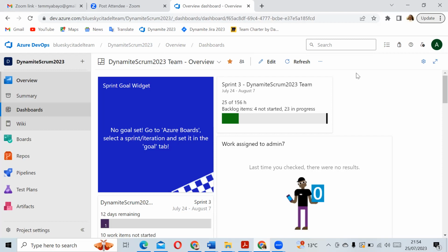So Scrum Masters, that's another coaching you need to give your QAs. When they create a bug and they want the developer to work on it during the sprint, they need to put the severity there. And once they save it, they shouldn't save and close. There's a drop down beside that. If they click on that drop down, they can save, then go back to the state and click in-dev. So that takes it back to the developer to work on.